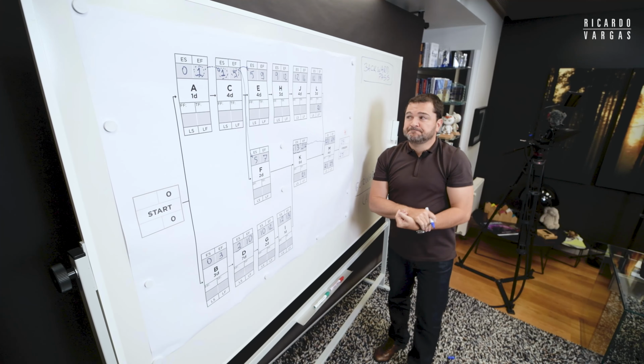And now, one very easy thing to do. Every time you are on the critical path, both fields related to float, meaning the amount of free time that you have, are zero. If you are on the critical path, you have absolutely no free or total float. So then it's very easy. You put 0, 0, 0, 0, 0, 0, and here. Okay. So we did this.